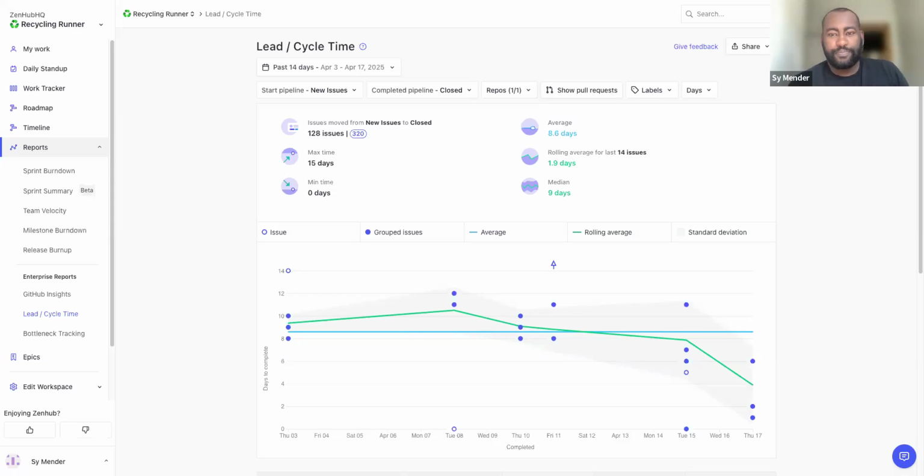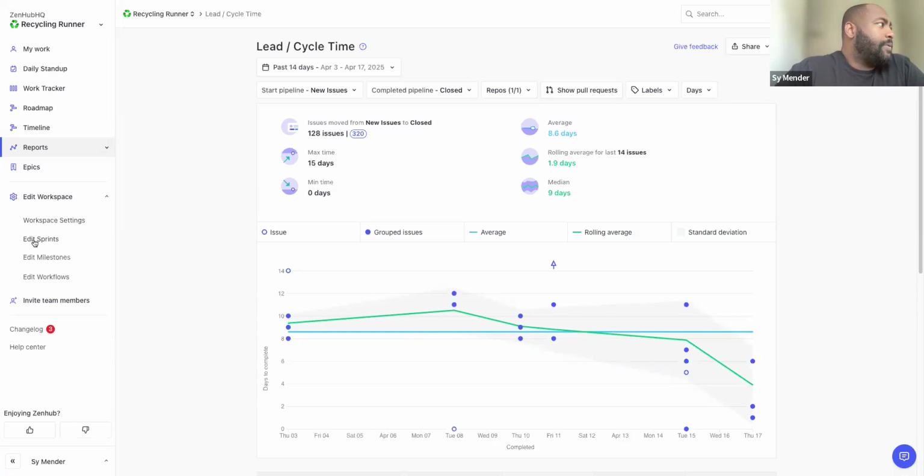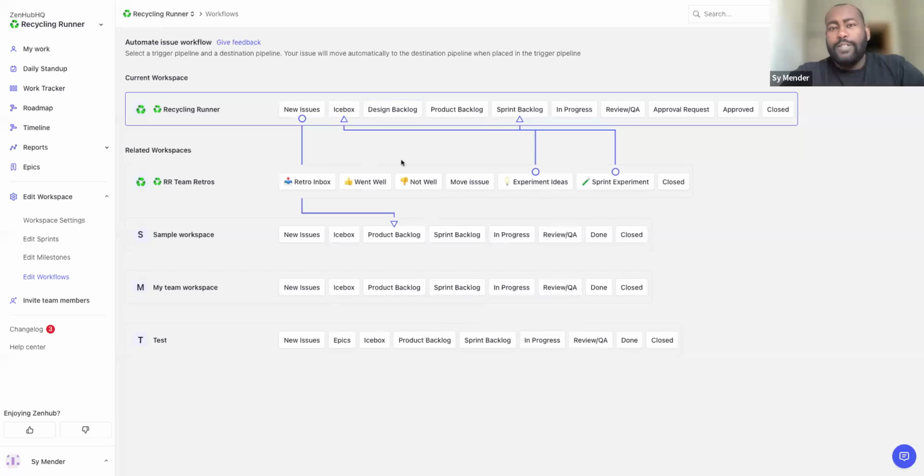Anyone else? How do we set appropriate limits in Zenhub when we have team members working across multiple projects? Great question, and there's a very specific answer to that. What we can do in that context, and what we do to some extent internally, is we can go ahead and take advantage of workflows. So what we can do here is take the workspace for each one of the individual boards that team is working on, and then pump them all into what we call an executive workspace. So all the information from the smaller workspaces will end up feeding into that larger workspace.